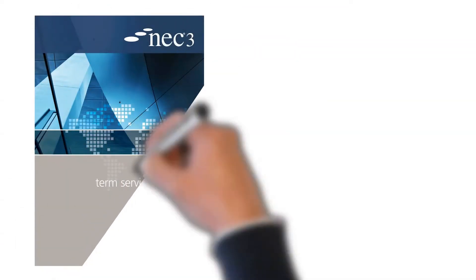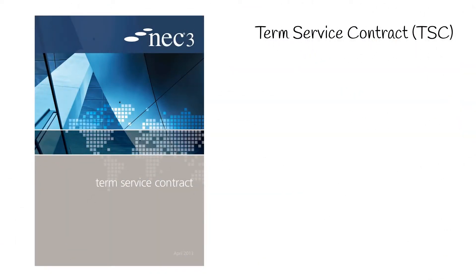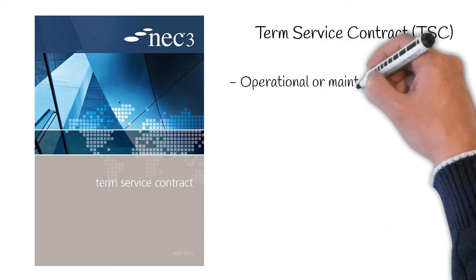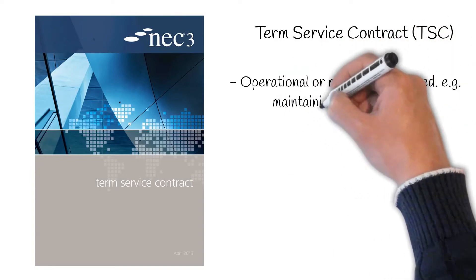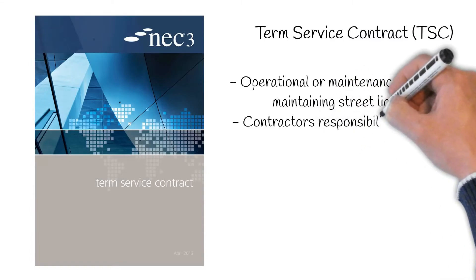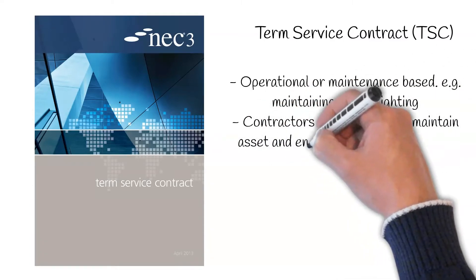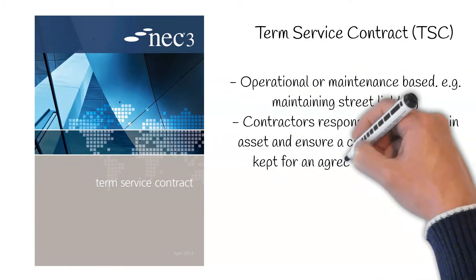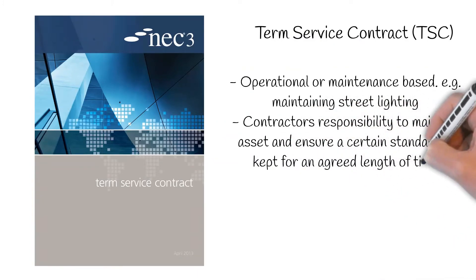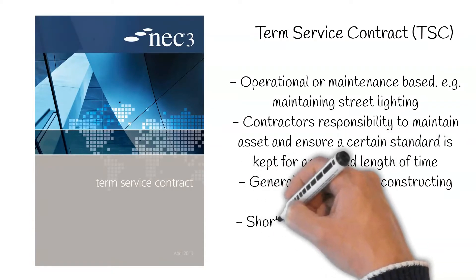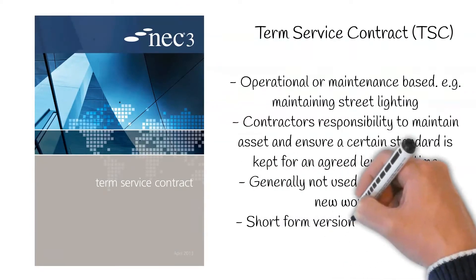Term Service Contract, or TSC for short. This is for a project which is operational or maintenance-based, for example maintaining a highway asset like street lighting. It will be the contractor's responsibility to maintain the asset and ensure a certain standard is kept for an agreed length of time. This contract isn't generally used for constructing new works. There is also a short-form version of this contract for low-risk work.